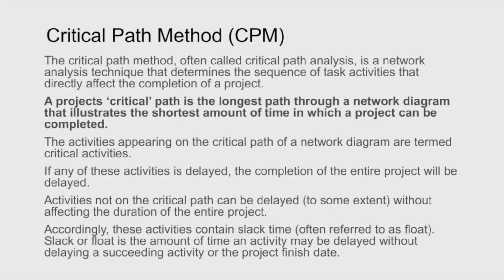Another tool in the toolbox of project scheduling is the critical path method, and it's often called critical path analysis. It's really a network analysis technique that determines the sequence of task activities that directly affect the completion of the project: the shortest possible time in which a project can be completed. A project's critical path is the longest path through the network diagram that illustrates the shortest amount of time in which a project can be completed.